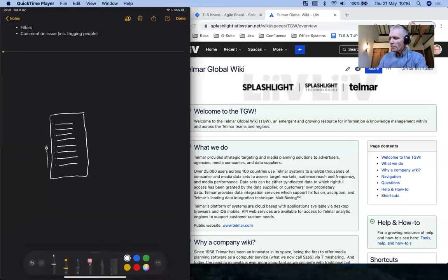Now, the reality of that is the stuff that's high priority is going to be at the top of the list, and the stuff that's lower priority will be at the bottom. And that tends to mean there's a lot more precision at the top of the list than there is at the bottom. Because if you've got a list of 2 or 3 or 400 projects or items here, you're really not going to spend a lot of time going into a great deal of detail on these items at the bottom of the list. But the items at the top, almost certainly, they'll be much more well-formed. So think of it like a graduation where the top is very clear priorities, fair amount of detail, well understood. And as you go down that list, the stuff at the bottom, it's agile.